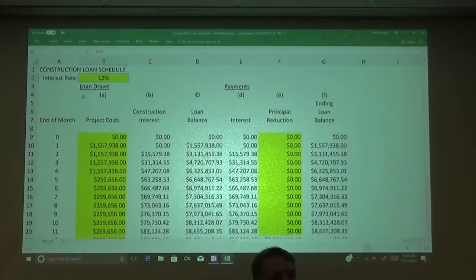The way it works is you go in and say, here are my plans. It's going to cost me roughly $8 million to build this thing. I want, in essence, an $8 million line of credit. Over however long the construction period is, whether it's a year, 18 months, or 2 years, depending on how big or small the project is, the lender is going to allow you to come in, typically at the end of each month, and deliver them basically a box of receipts.